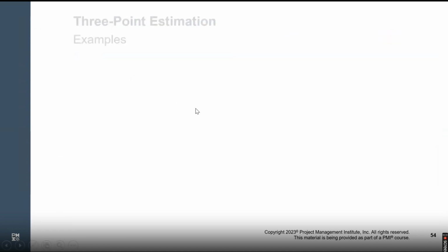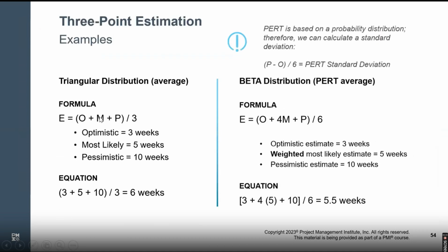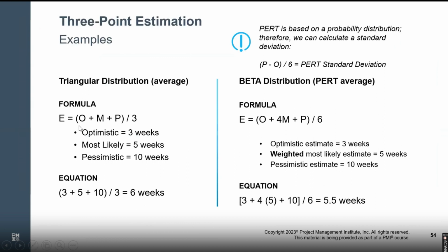We'll be using these methods. So that's the triangular distribution. This is equal weightage, which is honestly not the right way. We don't use this. Why? Because no software will be using this. None of the software use this method. Every software works on the beta distribution, the PERT method, which is what we will now use to calculate the timeline, how long it will take to estimate the timeline.